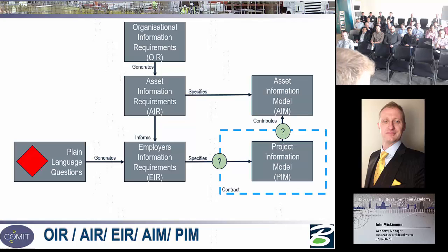These EIRs are tested by plain language questions. They've always been a little bit contentious over the years because these kind of questions can be at quite a few different levels. And we've all been very used to answering those level questions right at the very top. You know, how much carbon is in here? That's my plain level question to somebody about a car or whatever it might be. But actually, the real PLQs, the ones that allow you to run the asset in the end, are the ones like, where do I isolate this circuit to change that filter? That's what the maintenance guy needs to do.